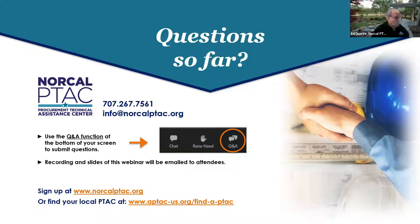Nisha is asking, I don't always see completion times or liquidated damages on these contracts when I peruse through them. Does that signify a problem or just a question for the procurement officer? Well, I've never seen a project advertised that didn't have a time limit. I don't know where you're looking, and I don't know what kind of jobs you're looking at, but on a public works project, in the general conditions, division one of the specifications, they absolutely have it. It's for their benefit. They want to tell the contractor, we want this job finished by a certain amount of time. And if you don't finish, we're going to charge you $1,000 a day, $2,000 a day, $3,000 a day, whatever. So I don't know how to answer the question other than to say that. It should always be there.